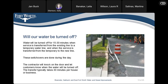We get this question a lot — will your water be turned off? Yes, it will be turned off for 15 to 30 minutes when the service is transferred from the existing water line to a temporary water line, and when transferred from the temporary line to the new line. Those switchovers are done during the day. The contractor will knock on your door to let you know when the water will be turned off. The transfer typically takes 30 minutes per house or business.